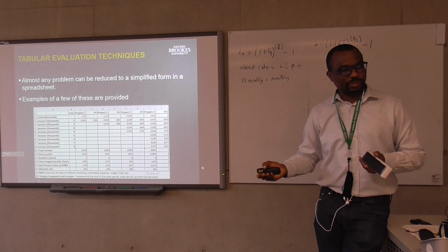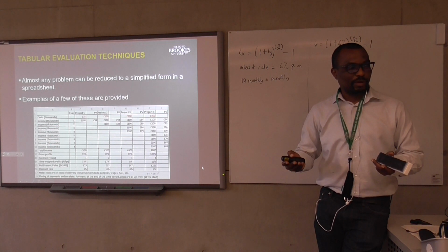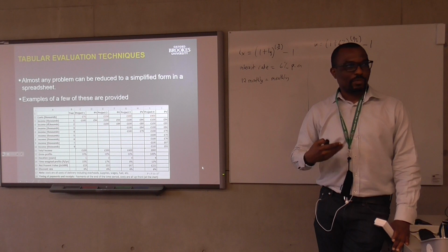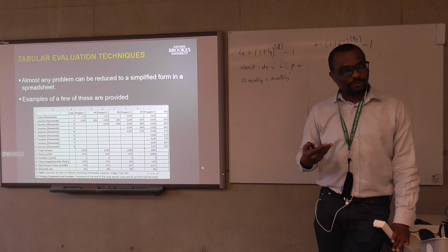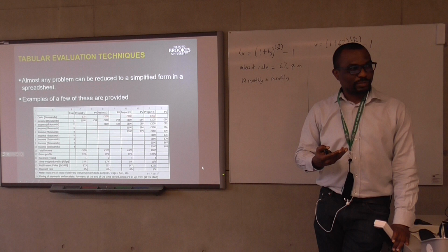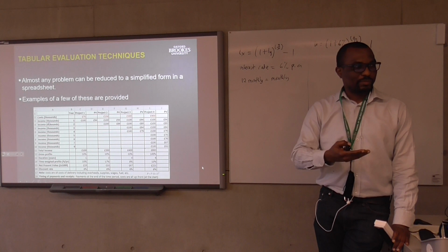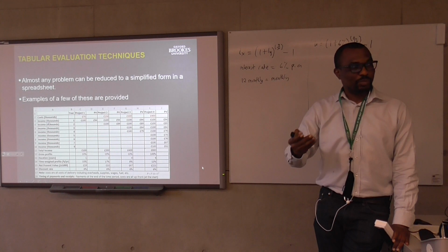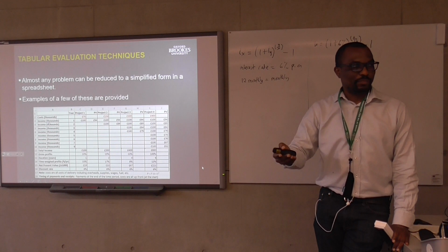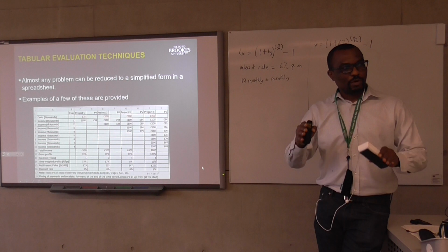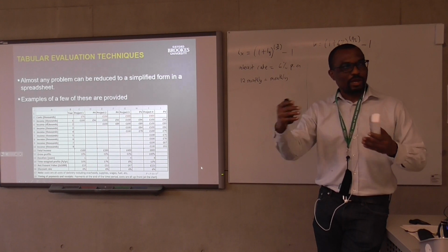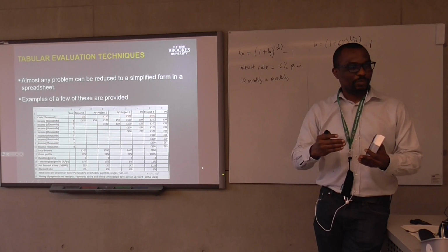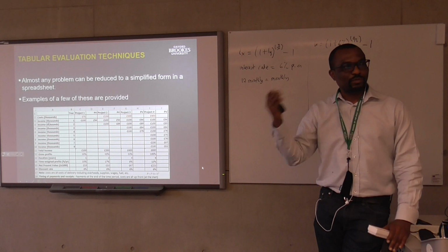It could be you want to do residential or a mixed-use development, right? Then you just talk about, okay, when it comes to an office block, what floor space are we likely to build? So you make those assumptions, and then you tell the architect, okay, this is my budget. My budget is maybe 2 million or 3 million pounds for the project. And you are able to compare the possible or likely income from all these 3 different types of projects. Yeah. And then based on that, you make a decision.